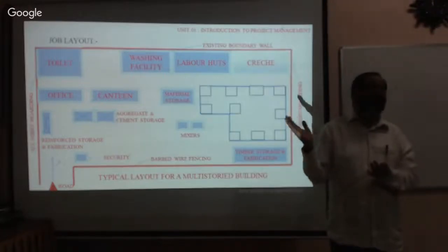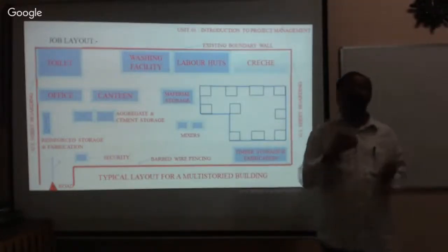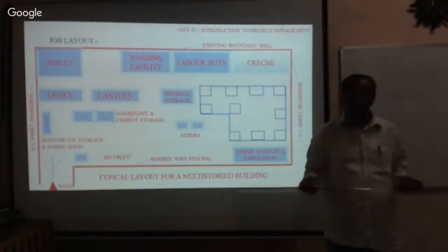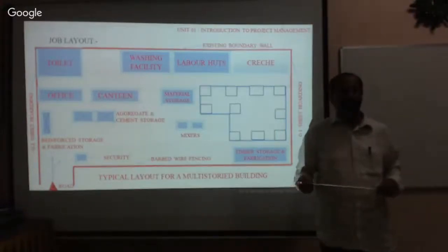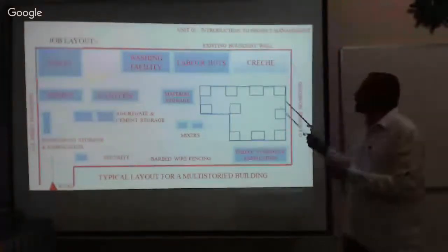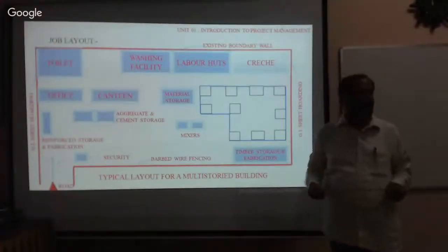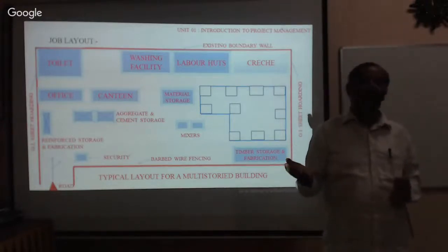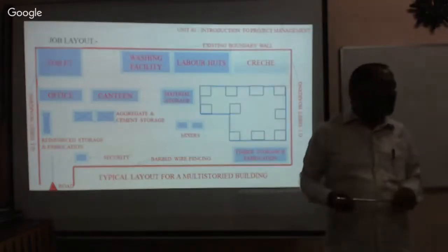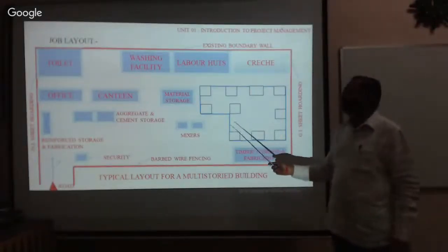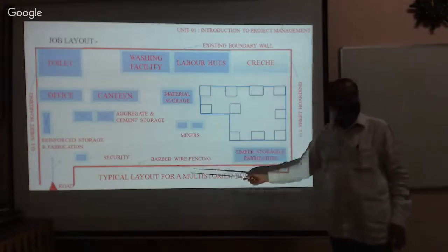If lady workers are working on the site, we need to provide a small shelter, a small home. Do you know about it? It is compulsory to provide. Small babies should be kept in the creche with all facilities: bathroom, toilet, and one ward to look after the children. Understood? Yes, we need to provide this. So you have to carefully arrange and organize it at the job level.